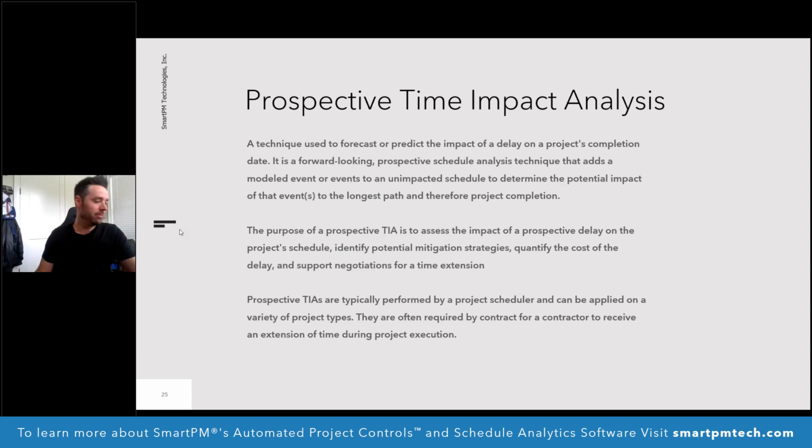All right, cool. So, prospective analysis, this one is probably the most used. I would say you guys probably have the best grasp on this one coming into it. Prospective, as it sounds, is a technique used when you have a future delay that you're anticipating. So we're talking about design changes, bulletins, things that are changing about the project that are set to occur in the future that we are then going to model into the schedule.